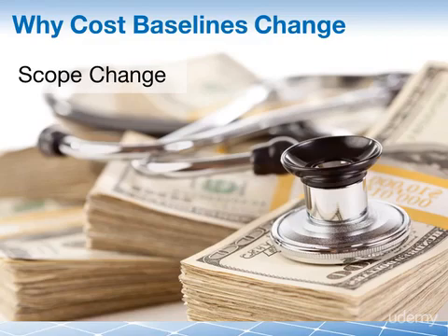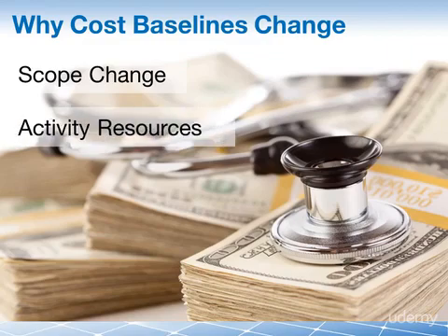If the owner revised the original plan and is now asking for an additional bathroom to be built, then the house renovation will likely become more costly. Scope change is not the only reason that the cost baseline can change. There are some instances when change in cost is so severe that it merits an update to the cost baseline. For example, the cost of activity resources may change. This can be driven by factors outside of the project. For instance, when labor rates change or when the cost of fuel goes up sharply.